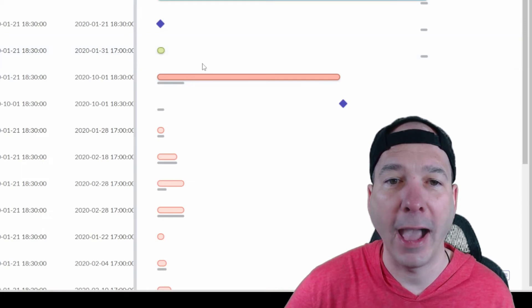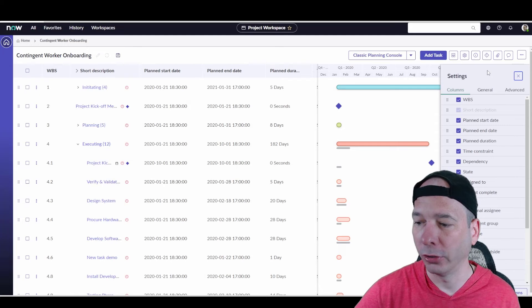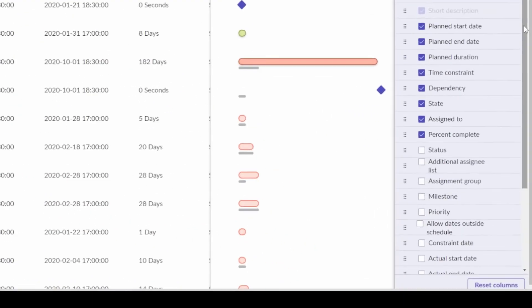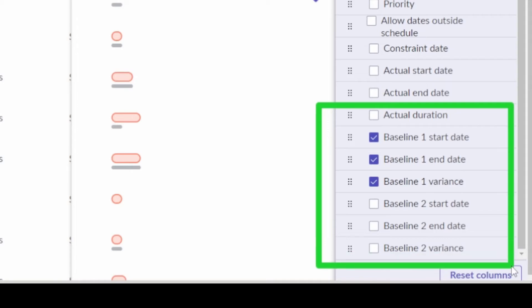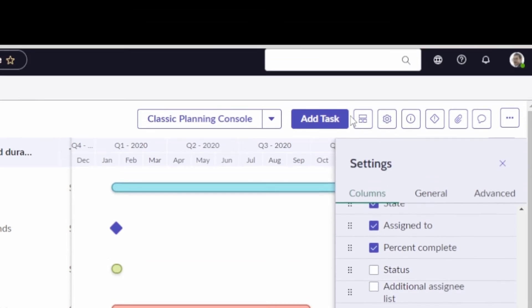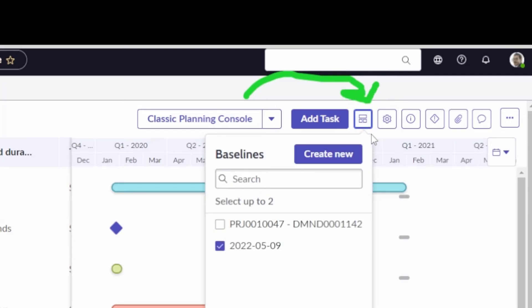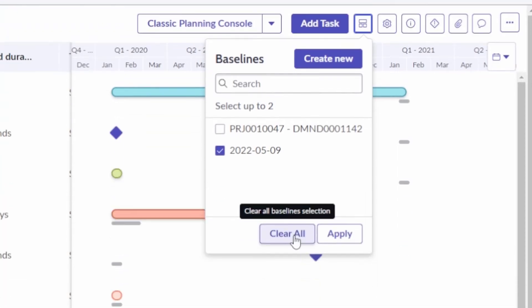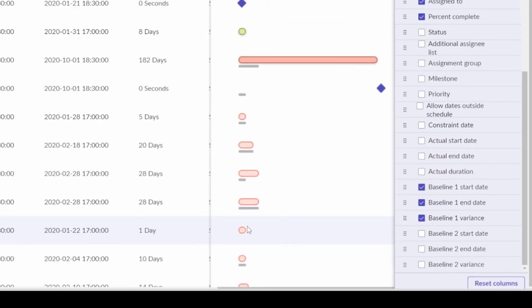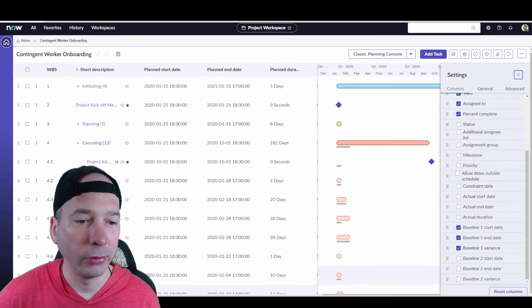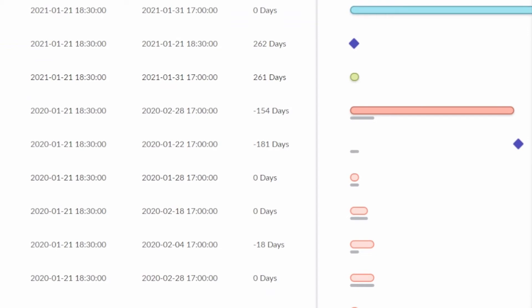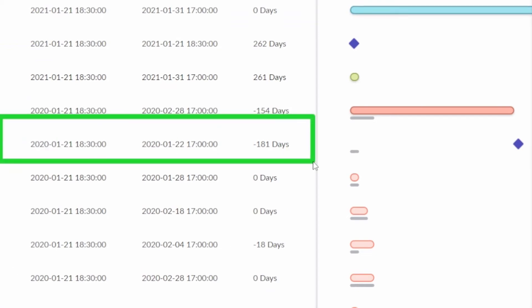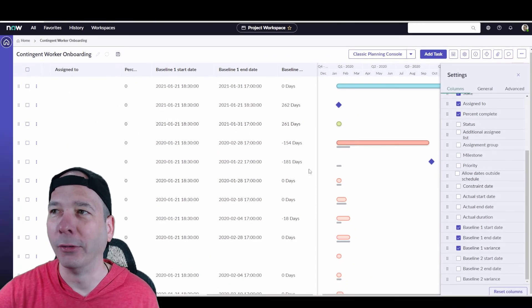But, what ServiceNow did is they added the ability to add some columns to our work breakdown structure. So, let me move my head so you can see here. If I scroll down to the bottom on the right here, you can have up to two baselines now showing in your work breakdown structure, baseline 1 and baseline 2. So, if I click the baseline up here at the top of the page, it's this little guy right here. If I click that, you'll see I get an instruction. You can create a new one, or you can select up to two. I only have one selected. And then, depending on which ones you've selected, that's the ones you can, either the one or two, you can add to your work breakdown structure. So, what's that look like? Let's scroll to the right for the one we were just looking at. And, we can see three new things. One is the baseline start date was January 21st. Baseline end date was January 22nd. And, our variance is minus 181 days. So, we are now 181 days behind schedule based on that baseline that we established there.